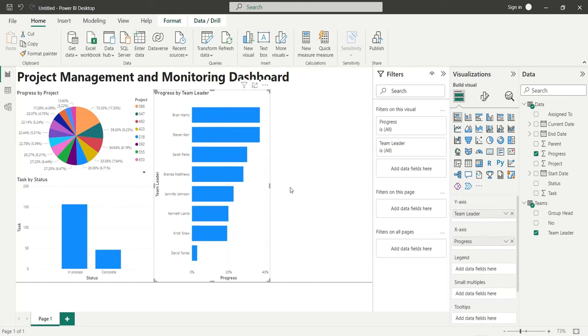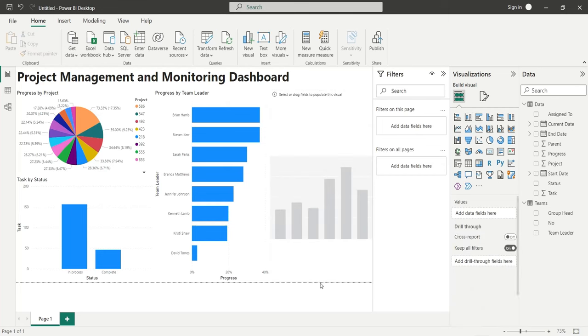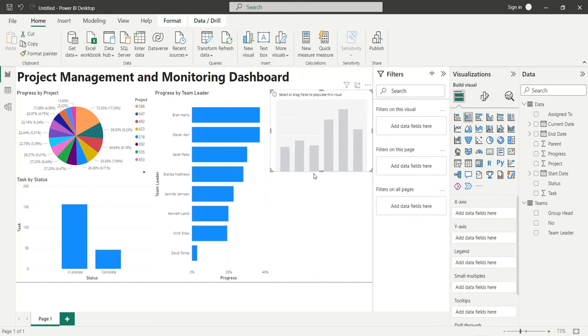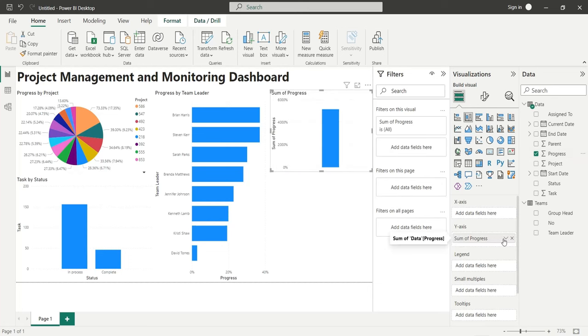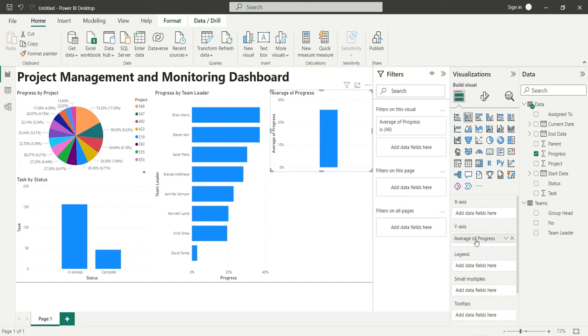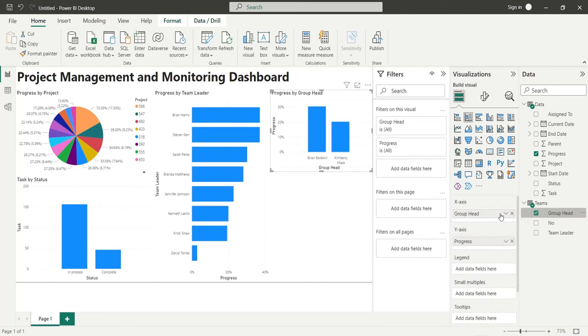Insert a column chart to analyze progress by group heads. Add the progress field to the y-axis as average. Add the group head field from the teams table to the x-axis.